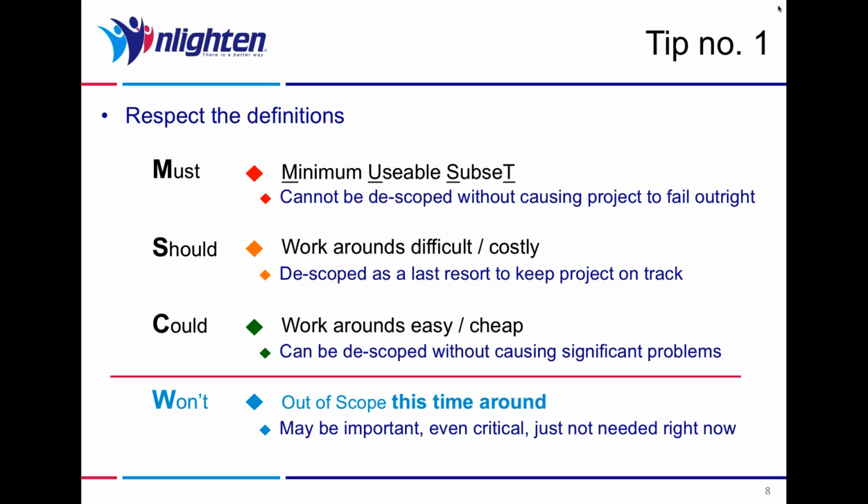In one particular project I was involved with, they fully realised that renewing a policy at the end of the policy year was a very important requirement, arguably never a must-have, because there was a workaround, and that would be you set up your policyholder as a brand new customer every time. So horrible workaround with all sorts of financial implications internally and all that sort of thing. So very, very, very high priority should-have requirement. But they knew that they wouldn't need that functionality until 1 year after the very first policy was sold.